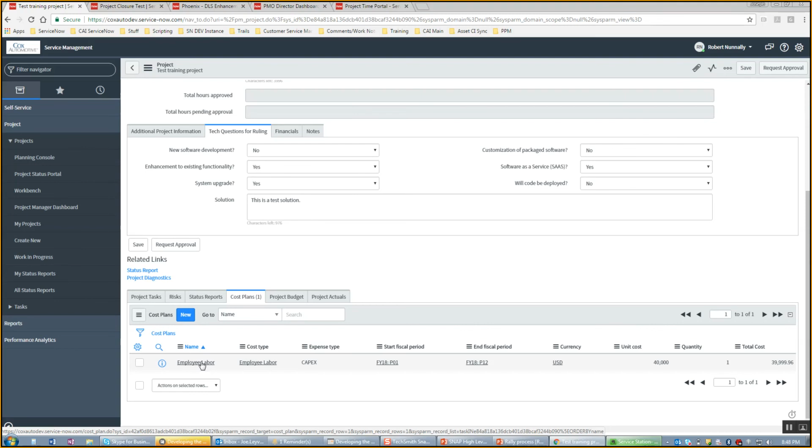Correct. And as Joe said, this is creating the estimate for the finance approver to say, does our department, does our organization have enough money to fund this? And of course, CapEx dollars are different than OpEx dollars, so that's why these designations are important. But this is building an estimate. Basically, it's building a budget for your project, and once that estimate is approved, that's a really good call out.